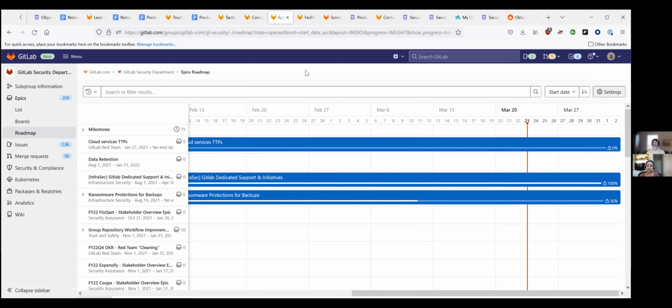Conversations. That's a great point. When I was looking through this, I was thinking in the mindset of building it as opposed to thinking in a mindset of its use pattern while I'm in the middle of it. And yeah, definitely within my scope and role, there'll be points in time where I see progress, but to me, what that means is we're behind and the end date is actually farther out than what's being shown, right? Because the amount of time each of these things are going to take hasn't changed, but the duration of one of them has changed, and now it's moving things farther out.